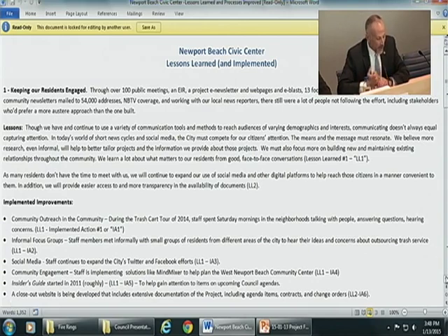But through all that, I fully recognize that the community didn't stay apace with the project's pace. And in some ways, there were a number of people in the community that would have expressed an uncomfortableness for the change in the scope. Our lesson learned was we need to be better about using a variety of communication tools to find people where they're at versus the traditional ones that cities usually use, which is to call you here to talk to us. We need to go out and talk to you.